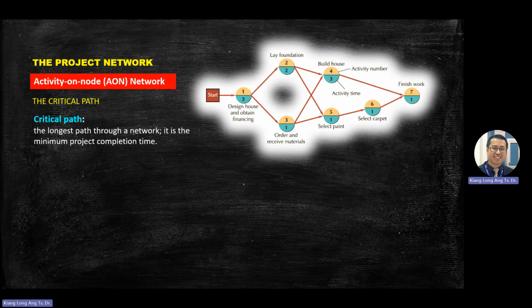The next one is to calculate the critical path. Again, the definition of critical path is the longest path that you can see in the network. So what is the path? Path is like you are calculating the way water flows inside this network. It's like you put in the water hose here, open, so the water will go inside here. Then you count how the water flows, right?